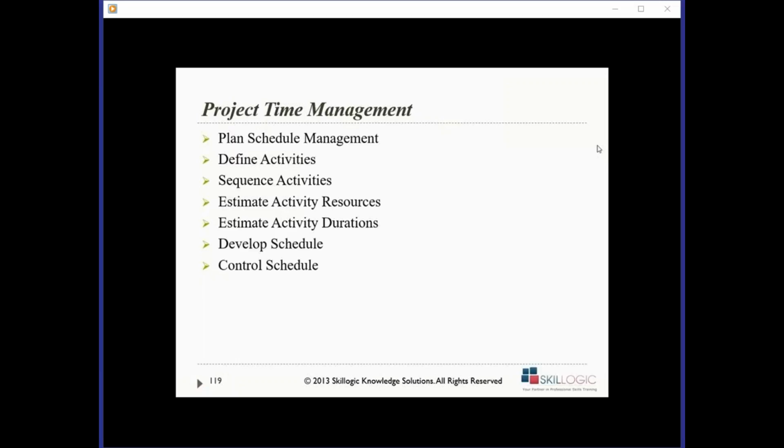Now, I'm not saying 5,000 is the threshold value. It depends upon you and your project board. It depends upon the comfort zone that they have. It could be just $1,000. It could be $1. It could be $0. It could be 10,000. It could be $100,000. It depends. After the threshold, any change which is evaluated by the project manager goes to the project board.